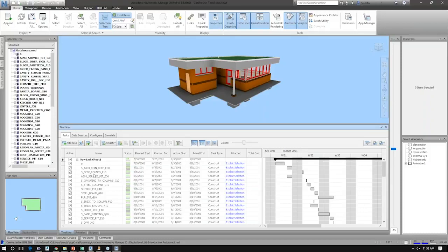Well, floor slabs. So suppose for a large project, you're pouring an enormous floor slab, and that's going to be broken down into several tasks as the pours happen on various days. Well, a Revit slab isn't modeled like that. You model the entire floor slab for that level, and that's what you have. If you wanted to break out that floor slab into separate pours, you're going to need to reconstruct that Revit project and break out that slab into separate objects so that you can then assign those to individual tasks.